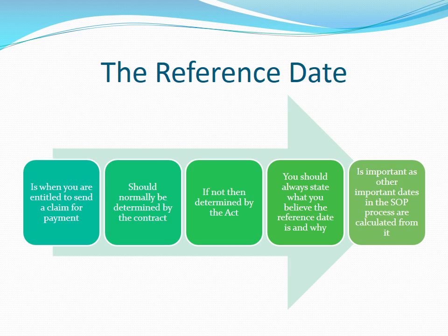Whilst it is expected you already understand the security of payment and legislative requirements, we draw your attention to the importance of the reference date and ensuring your contract states when you are entitled to make a claim for payment and when that claimant has to be paid. If the contract is silent, then such dates will be determined by the legislation.